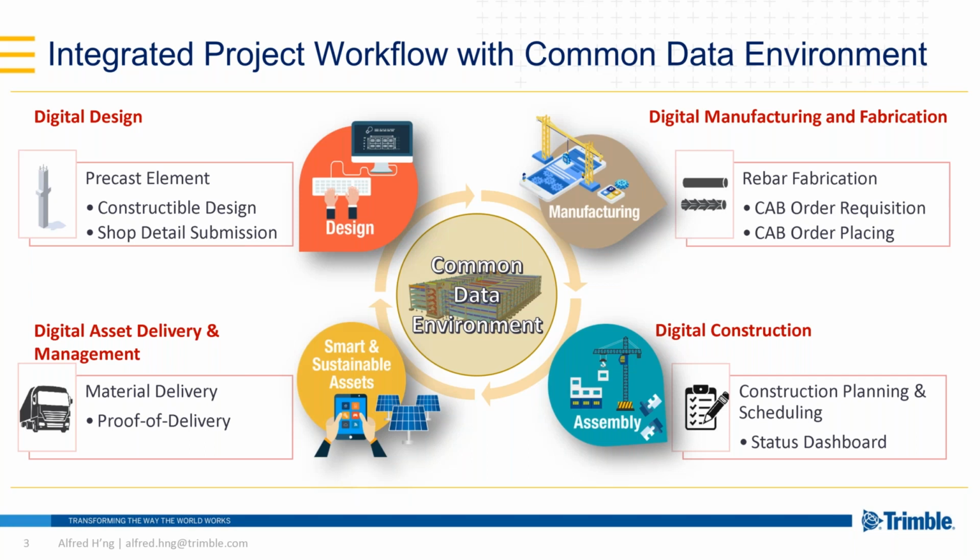Last but not least, a status dashboard was developed to track various construction statuses of precast elements with barcode scanning. The aim was to produce overviews of project performance by looking into construction status in real time.